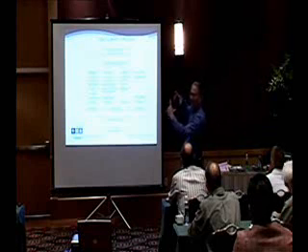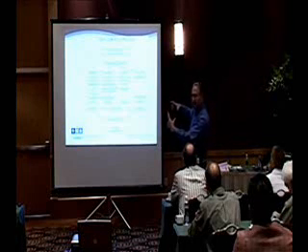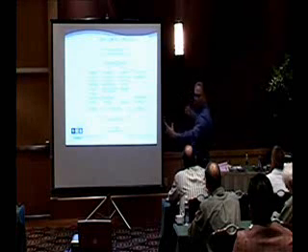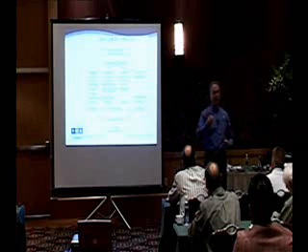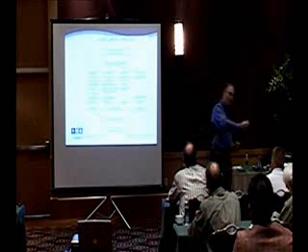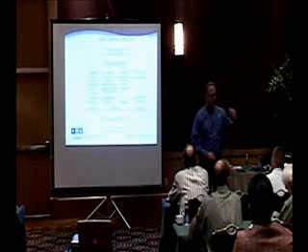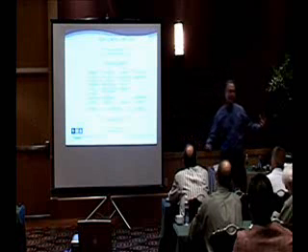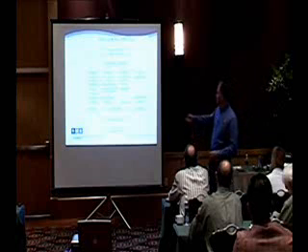If you build in the next ring of zone, it was the price plus some flat fee. Zone 3, zone 4, and so on all the way out, because we traveled great areas. But everybody knew going in that that was what we did. So we were looking for your bid for the base price, and then we would add this factor to it if you had to go from location to location. So we try to lock them in for a minimum of a year.